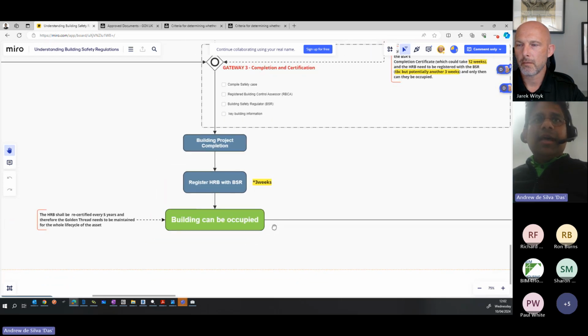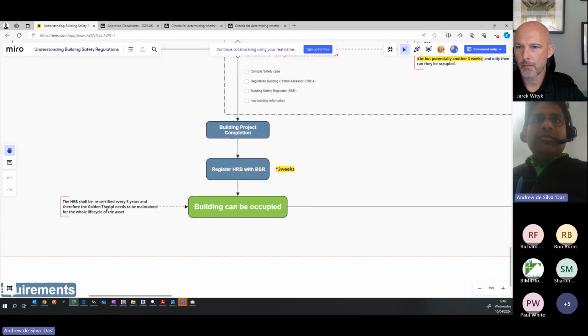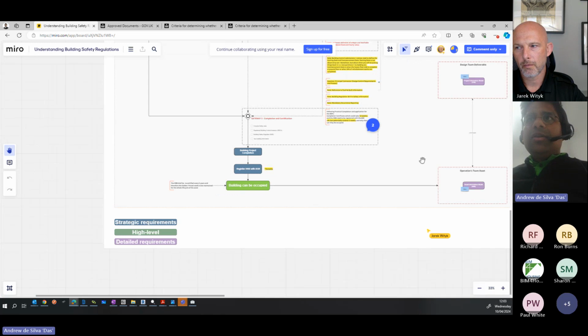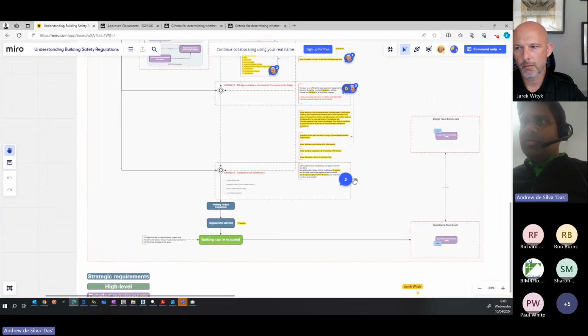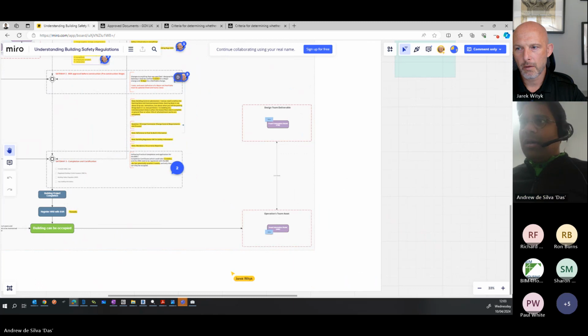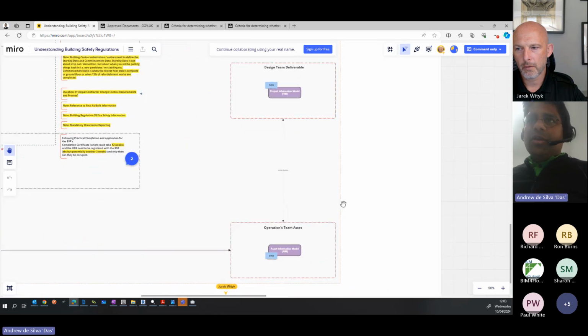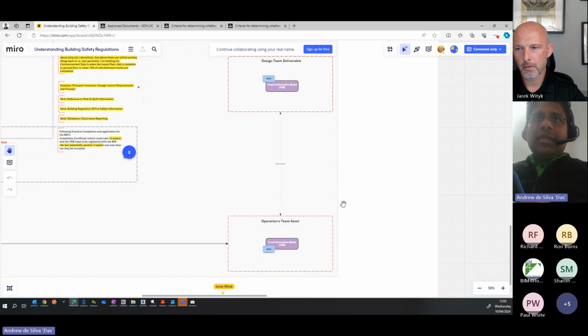And finally, our understanding is that it has to be recertified every 5 years, and therefore you come back to that earlier point that Jarek had about maintaining that. Actually, you've got some additional ones in here as well: maintaining that information, going back to the model, the EIRs, the OIRs, etc., and starting a new project. So keeping that asset information alive, which is all the things that George has talked about in more detail, with, for example, the active plan platform and other methods that people follow.